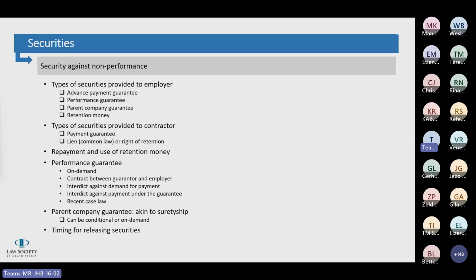So although it's accepted in South Africa that an innocent party can successfully interdict another party from breaching the terms of the contract between them, the autonomous nature of an on-demand bond dictates that a contractor would not have the same right in an instrument which creates a relationship between the guarantor and the beneficiary only, i.e., excluding the contractor from the guarantee relationship agreement. The contractor cannot readily interfere with that relationship. So the underlying contract exception has not yet been accepted into our law, although there have been many judgments recently where this issue was considered.